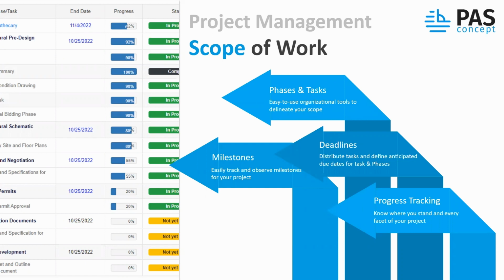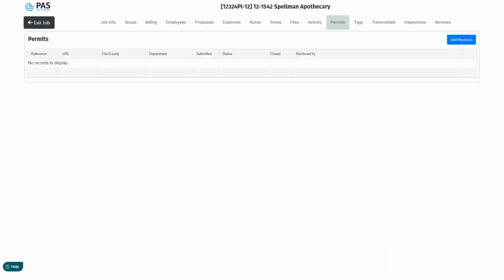Additionally, and this is a less desirable scenario, say you've underestimated the time it takes that task to be completed. Say you estimated 10 hours, but really it was a 25-hour long task. It would be foolhardy to look and say, oh, well, they've used 9 hours, they must be 90% complete with that task. Simply not the case, which is why there is a distinction between time used and progress. And actually, let's hop right into it. So let's go back here and let's take a look at the scope of work.